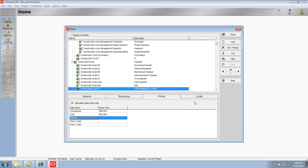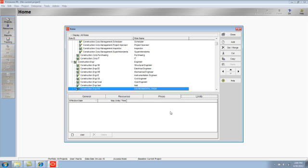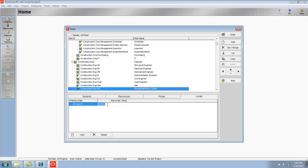When I go to the Limits tab, I'm able to identify the maximum available units for this role. It's based on the effective date. If I click Add, I can then identify the maximum units per time that that role is available to fill activities. In other words, it's very useful in role profiles to help determine the capacity you have to fill this role.